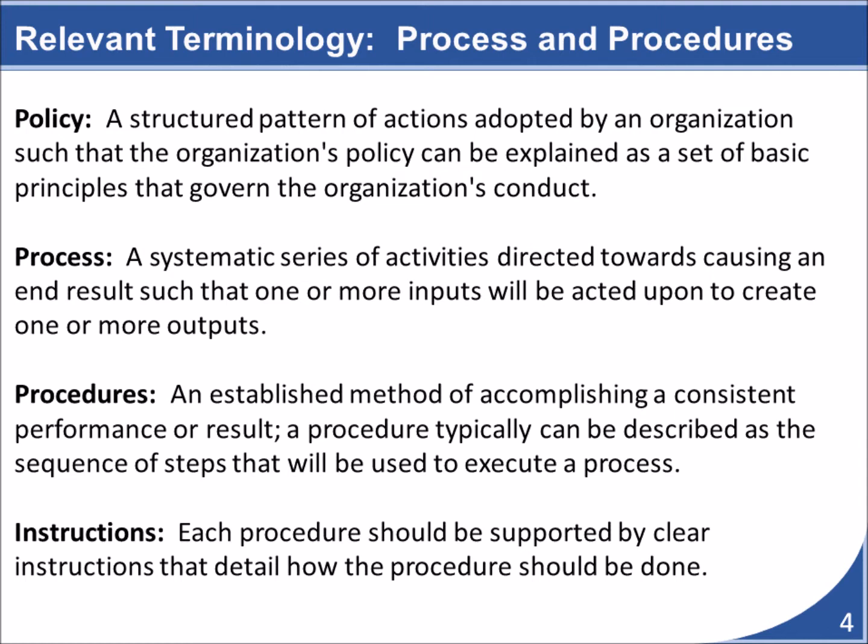Policies specify the principles or rules behind project governance. Processes define logical workflows for the projects. Procedures define a set of implementable steps that describe the details of each process. And then finally, instructions specify how the work for each step in the process needs to be done. Collectively, policies, processes, procedures, and instructions describe the industry best practices and define how work on a project should be done. Let's see how that works.